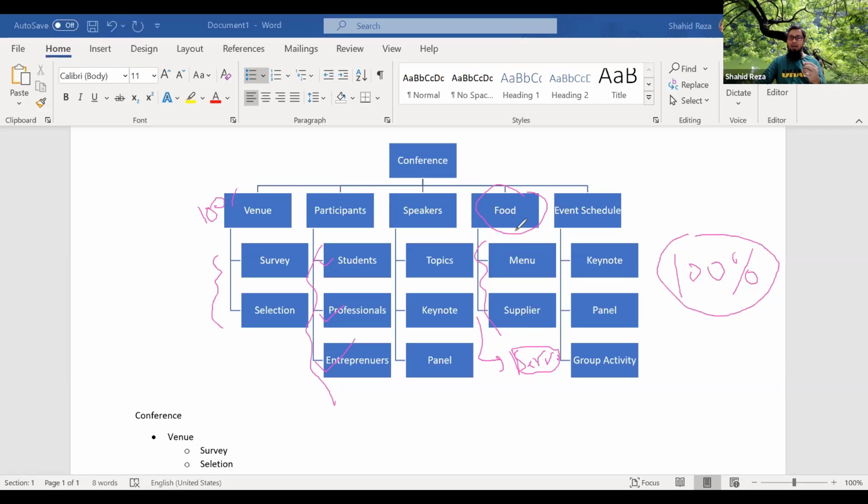So when we are breaking down into sub-components, this term is known as decomposing. What we are doing actually is decomposing a parent into child, or a big component into sub-components. As per the PMBOK lingo, that is known as decomposing or breaking down. So if you follow the 100% rule for breaking each component into sub-components, then nothing will be missed.